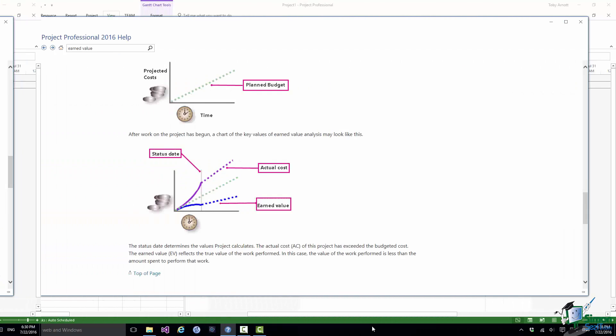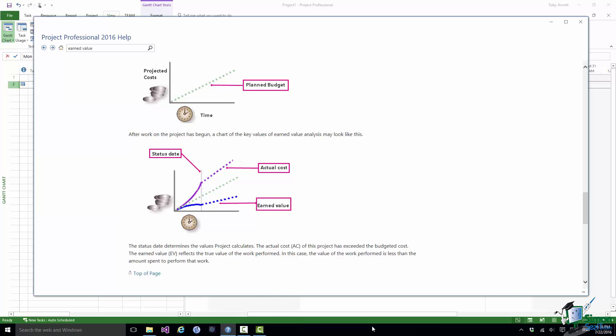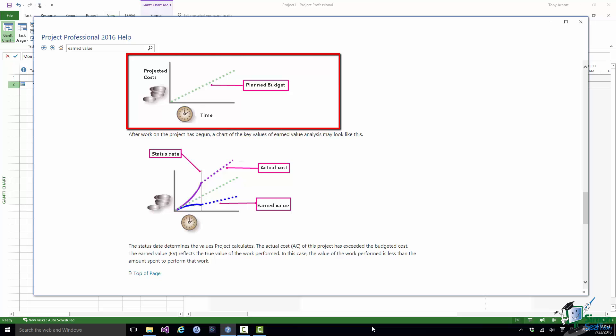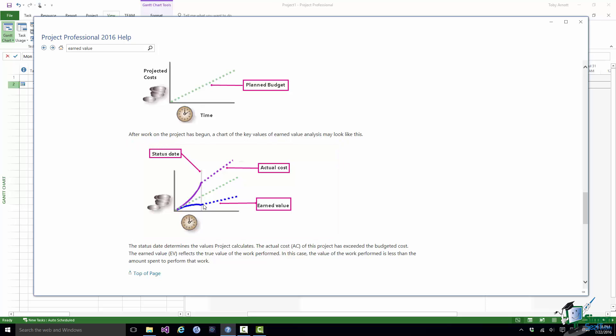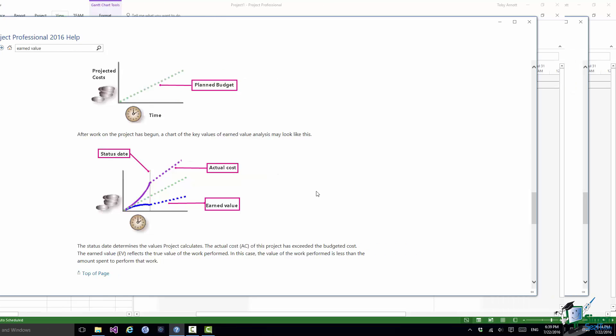And now in that same help topic there's a little graphic just further down from the definitions you just saw. It's a really helpful little graphic. If you look at the top one there there's a planned budget for a project. Nice diagonal line there. And then below that we've got a project that's going badly. You can still see the diagonal line if you like the scheduled but the project is not performing and it's costing more to do everything that we're doing. So the actual cost of the work performed is high and we're actually earning less than we should be so the earned value is low. The budgeted cost of the work performed is low. So EV is low, AC is high, things are not going well.